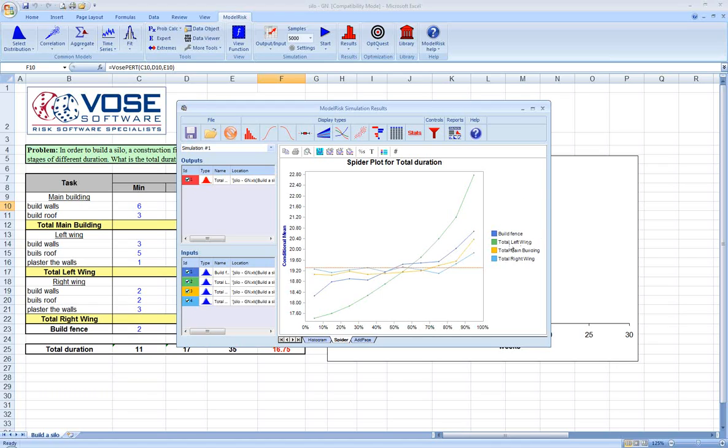This green line, or the one that has the highest slope, is the one driving the largest amount of variability in the output. In this case, it's the total time needed to build the left wing of the project. For instance, if we wanted to reduce the variability or the unknown piece of the duration, we could go back and look at the estimates for the left wing.